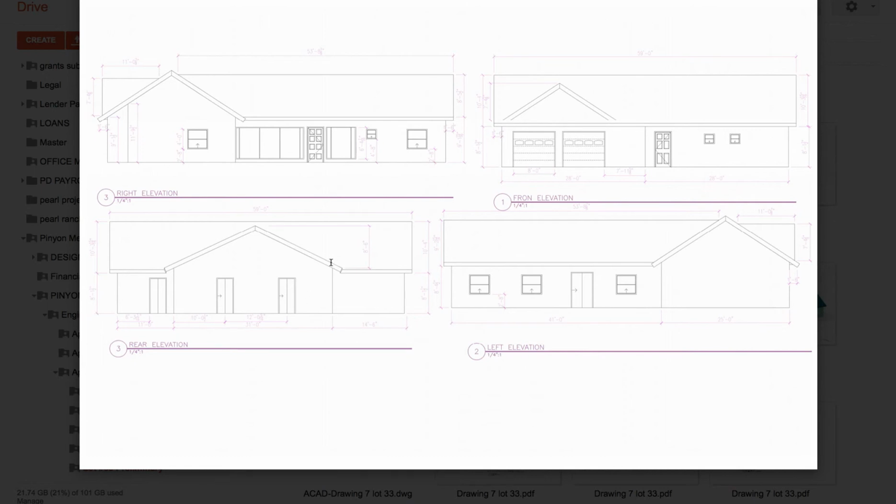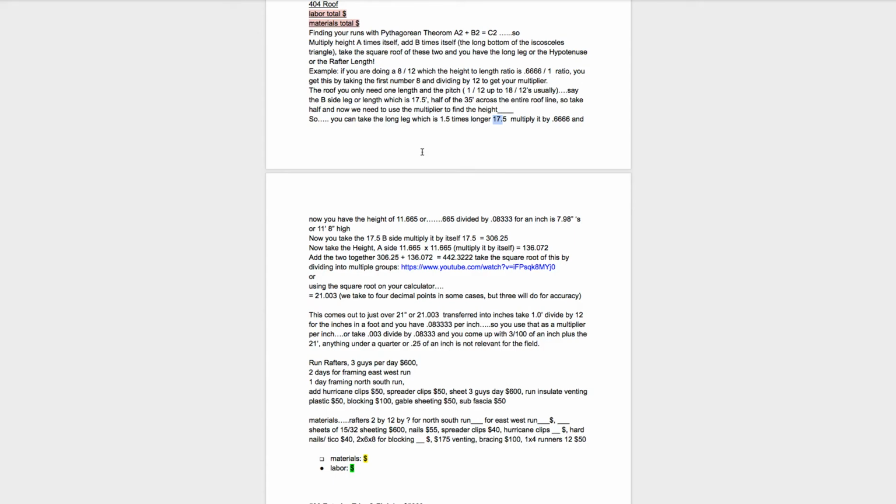But the rafter has to go over, right? The hypotenuse has to go over because we have an eave right here. We're marking the eaves 1.6 again. All the way around the house, the eaves are 1.6. So we're going to add 3 feet onto this 31. That makes this 35 feet, 35 feet with the added foot for contingency. So let's go back.